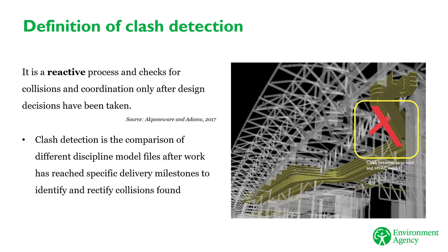Clash detection is the reactive process of checking all individual models in a single federated model environment. Combining design models from multiple disciplines in a single model file enables further inspection of the multidisciplinary design in coordination review workshops. The lead designer and project manager will agree and assign resolutions to team members to rectify the models for them to become clash-free.